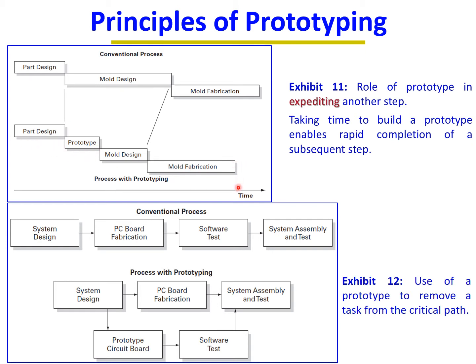Even with the additional time and cost of building a prototype, the overall process from start to mold fabrication is shorter. Sometimes you'd assume prototyping only adds time and cost, but here the total time until mold fabrication is actually reduced by 10–30% by including prototyping and creating a better mold design.